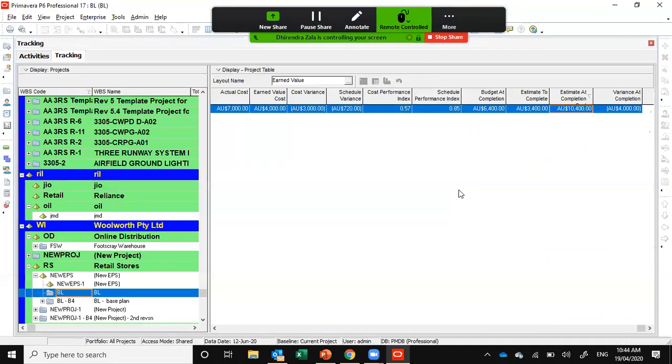And also we get the cost, what was spent to achieve that value. We get it from our internal team for commercial, the actual cost. And by putting all these things, planned value, earned value, and actual cost, on a cumulative basis, I get that S curve.